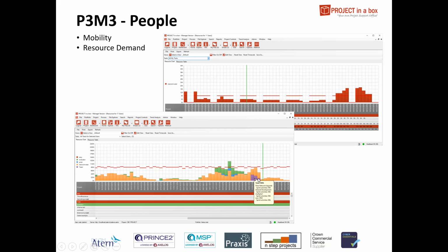And I can see that although, as we can see here, I had quite a lot of things to do later in the month, actually that's not a particular problem because the rest of the team members don't have very much to do. So we can therefore rejig those tasks and allocate them to other people. So it's really useful like this. I've been able to look at a combined picture. And I had some free time back here, but maybe I could have picked up some tasks that other people were doing. So we can start to even that sort of thing out, and we can look at that in detail and see exactly what that requirement is.